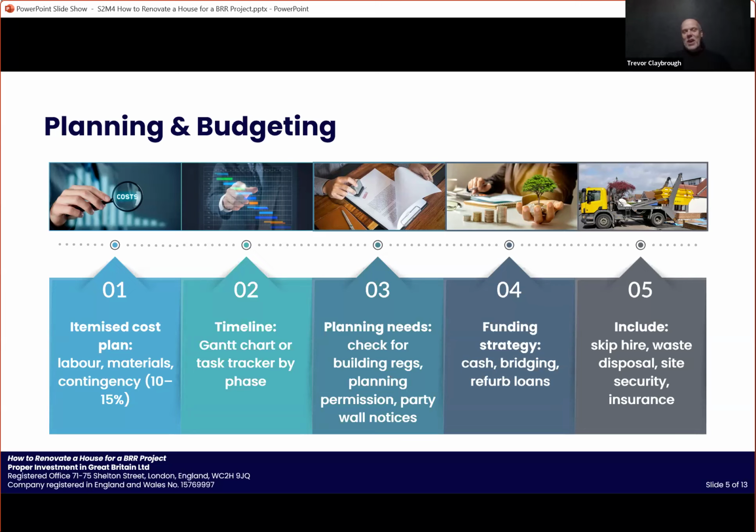without contacting the tradesman. Because if we go in a house and we understand that the ceilings need skimmed, the walls need skimmed, but we haven't got to replaster, we know how much that costs, and we can just put that on the quote. We know how much it costs in general to do a new bathroom, a new kitchen. And when we're looking at a project, we'll put together an estimation in probably half an hour. And in practice, those estimations turn out to be quite accurate.